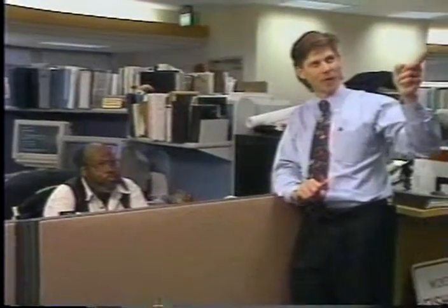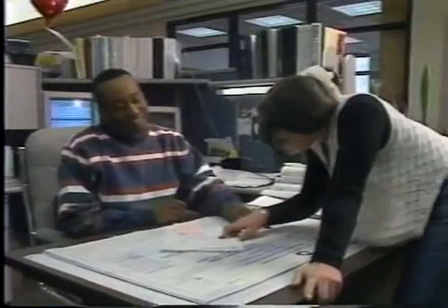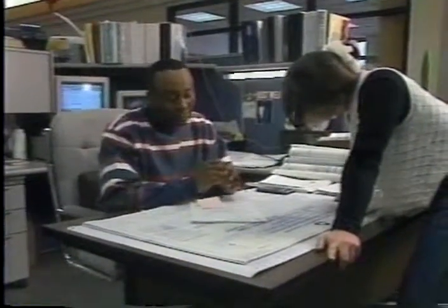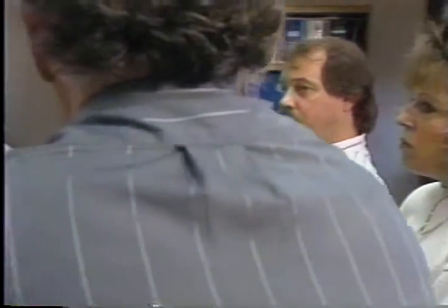Planned manpower is distributed for each contract. It should be distributed by monthly time periods. Manpower should always be distributed over the length of a contract. Balancing monthly manpower requirements determines the total needed by comparing the number of personnel available with the number needed. The need for seasonal or part-time employees can be determined.